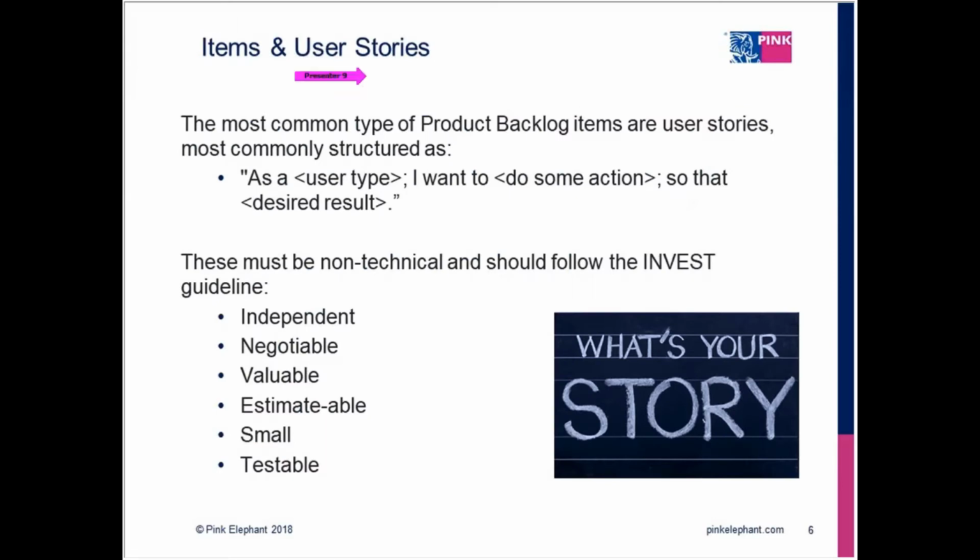This is the most common way we refer to things in the product backlog. And the user story is the most common way to gather the requirement. And being agile, we want to avoid any upfront waste. Documenting requirements in detail upfront is a waste. And so the user stories are a very simple way of gathering just enough information, not to allow developers to go ahead and start developing.